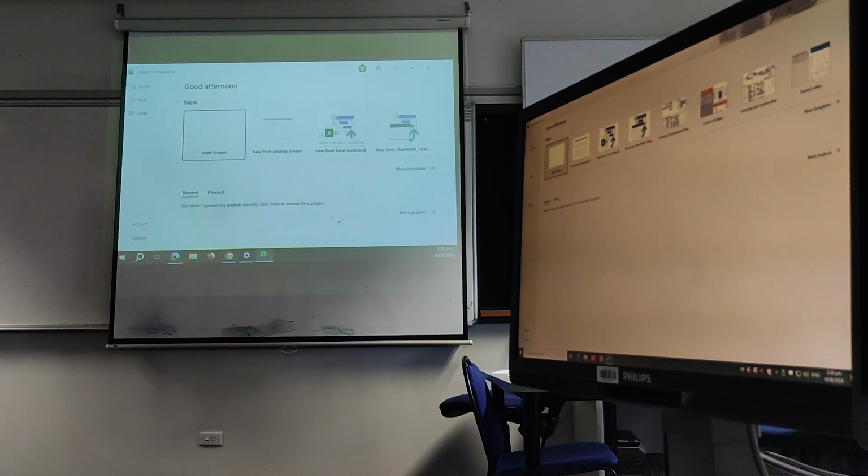What you will do with Microsoft Project is come up with a Gantt chart, and then look at it and say, I can make this plan better by doing this or by doing this. You might do the first run through and say, it's taking 15 weeks, but we've only got 12 weeks to do the project. So I need to reduce the duration of the project to 12 weeks. How can I do that? I put in the durations, I put in the sequencing, and I come up with 15 weeks. What can I do to make the project shorter? Do it in 12 weeks.